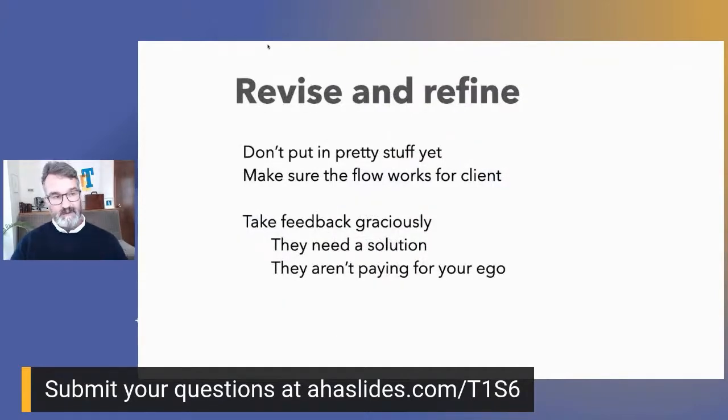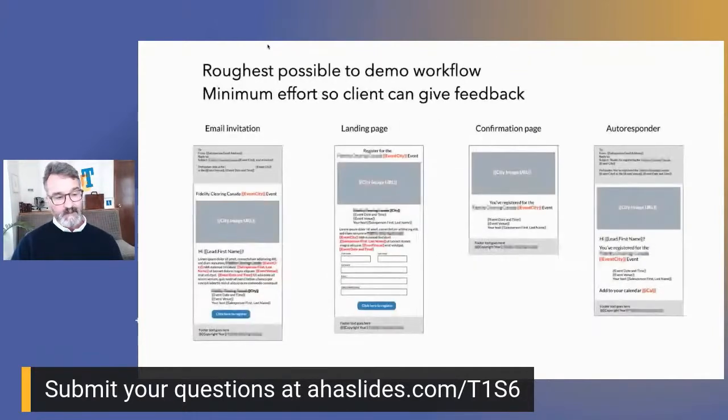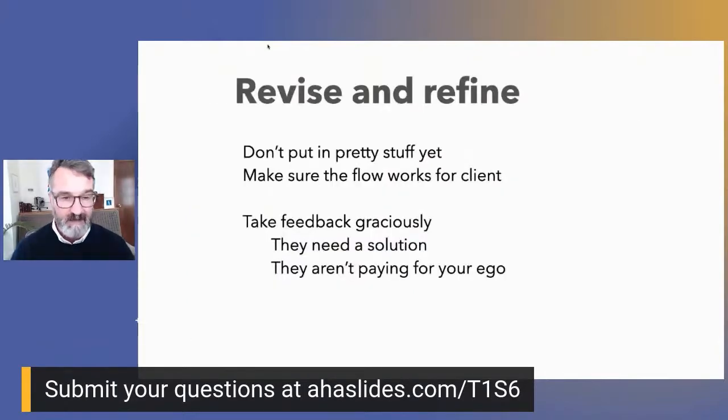Then I start to actually build. Here I'm doing a rough test with all the stuff in there. If it's complex, I actually leave out all the pretty pieces and I just make sure that the lead flow and the user experience is working in Mautic. I'm making sure that the marketing automation platform is working the way it's expected to. I want the client to see this. I don't want to start building out a beautiful marketing campaign that's broken. Again, that's time, that's money. So I build it. So as you can see, you start with super rough sketches, you go into wireframes, and then finally you're building it in the platform itself. And then when they like it, then you can add in all the beautiful bits and pieces, okay?